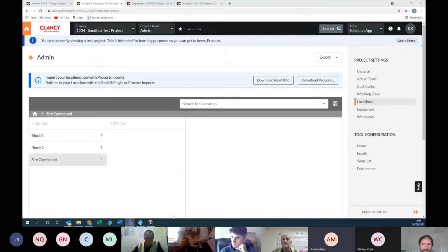I think, Brian, it's very good for checklists as well. If you're closing walls, you want to take photos of the walls, and it brings you right to that location. It's also very good for installing the fire doors. You can have a tag on the back of every fire door, and the carpenter can take photos of every door before he puts on the architrave, to show the fire mastic around it, and you have your evidence. Correct, very good.